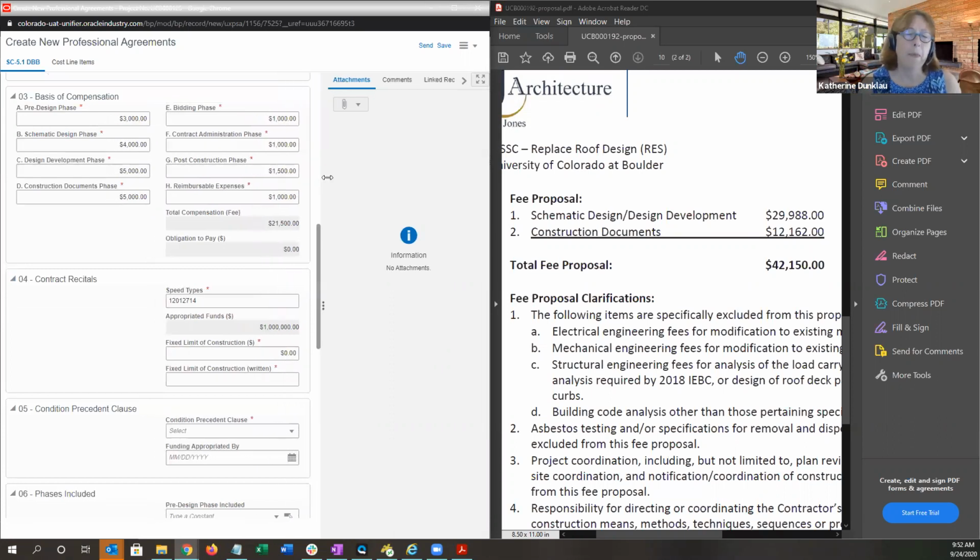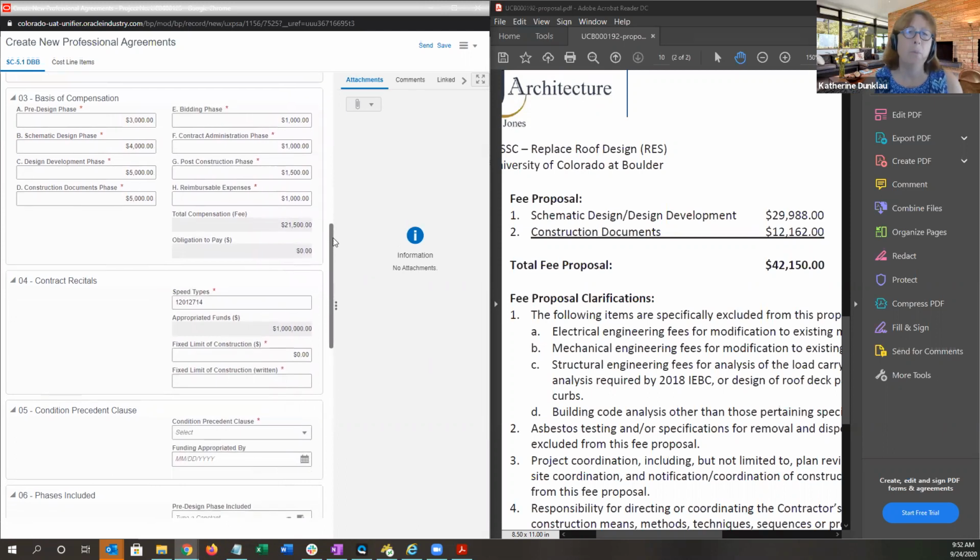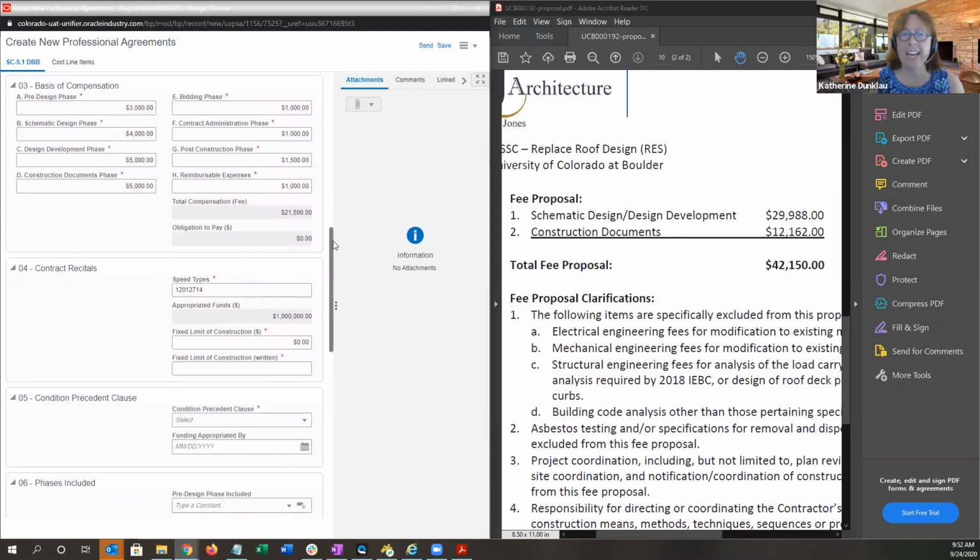So for the budget and funding training, Eric already loaded the costs into the correct fees just to save time. They would have all been lumped under the roll-up code, AE fee. When you receive the proposal, to your point, you go back to cost code allocation, edit it, move the numbers down, and then save it. But you also need to do it to budget.